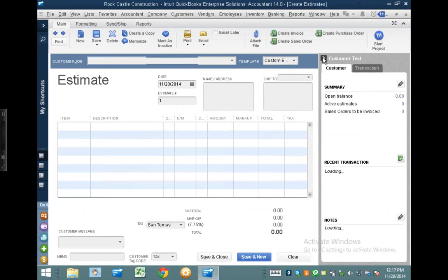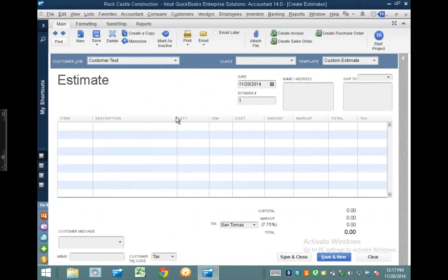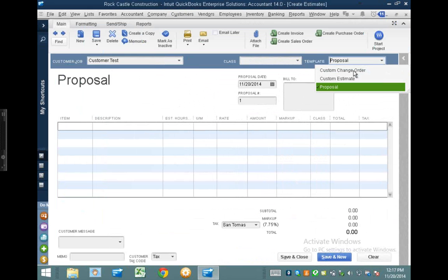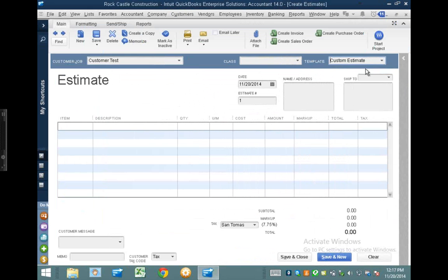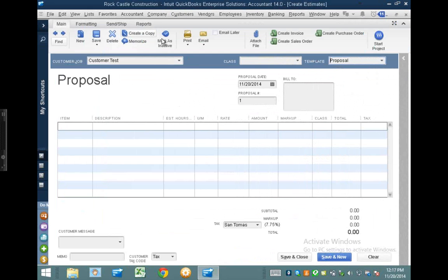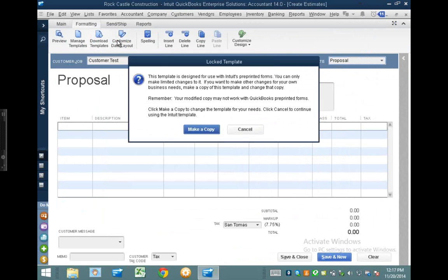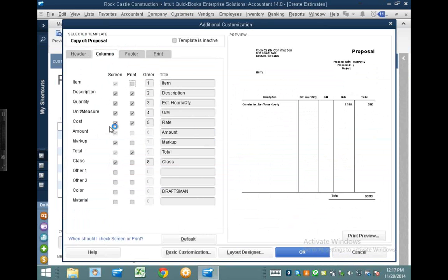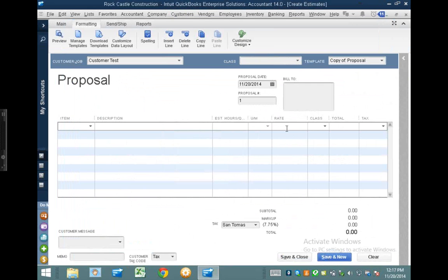The other piece that's extremely important for this is your estimate template must, absolutely must, have the markup column open. So what do I mean by that? If you're working off an estimate like this one, actually this one's not a good example. Okay, all three of these have it. So let me show you what it would look like without it. If you were to change the format here, under columns, you have this internal cost and the markup. If I have markup turned off, I don't have the ability to state my internal estimated cost on that particular item. That will completely render this exercise useless. So that's a very important thing.